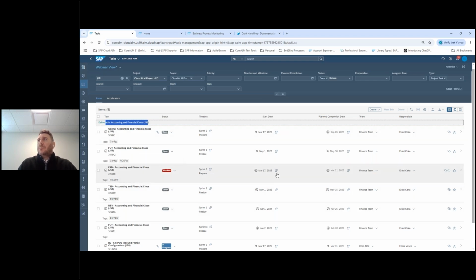You can plan at this level. You can assign sprints, as you can see. For example, FSDs. If we have a sprint 0, we can start the FSD, but we wouldn't get to our FET until sprint 3. So this is how we can do that detailed, more granular planning, and of course, following Scrum or Agile methodology.